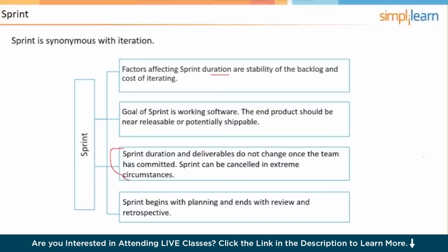In the planning meeting, the product owner has to be there, and the product owner is the main driver of that meeting. The product owner is talking about or dealing with the priority of the user stories. The team's weighing in. Maybe there's some dependencies that need to be considered, but the product owner has to make the hard decisions with regards to what's going to be done in the next sprint based on the constraints from the team, like velocity and technology and sequencing and things like that. So I kind of answered that from a real-world point of view. Yes, it could be. It's not desirable. On the test, they are completely separate.